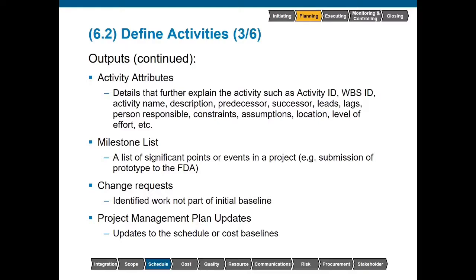A milestone list is a great way to keep stakeholders informed about progress within the project without getting them too deep into the details. If I tell you that we are 42% done with activity 2.4.9, that doesn't mean a whole lot to you unless you are really tracking everything that's going on. If I give you a list of milestones on a glide path, you're able to at a glance visualize exactly where we're at versus where we should be. The important concept of milestones is that these are not activities — there's no work being done, so they do not have a duration.